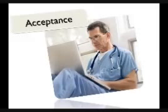Now, one of the major things that we are hearing from critical access hospitals, from clinics, is acceptance. Also in that is engagement. You know, we can force people to do things at some levels, but really to avoid failure, you need to seek out others to get to their acceptance and engagement of your EHR and its new processes. So lack of user acceptance is the number one cause in the failure in this arena, and that is in that stakeholder management arena. Unfortunately, time was not taken to understand each user and their abilities with technology.